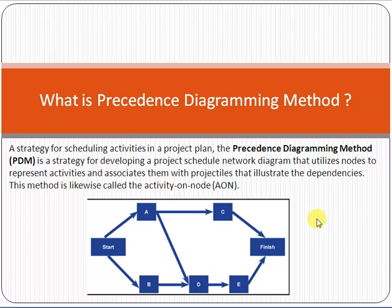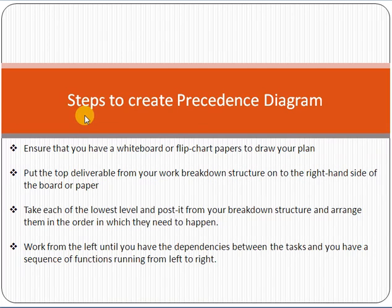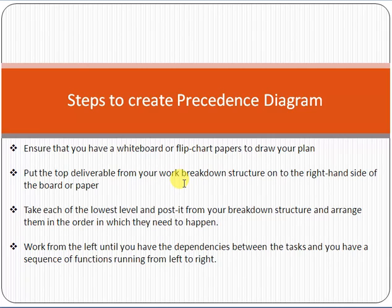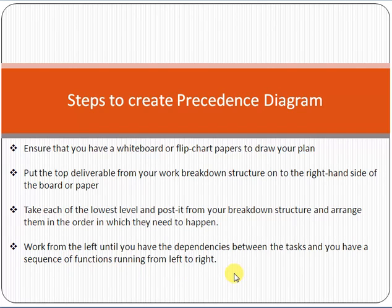This is the concept of the Precedence Diagramming Method: first identify the activities, then identify the dependencies among the activities, and then sequence the activities to make the schedule. The steps to create a precedence diagram include: ensure you have a whiteboard or flip-chart paper to draw your plan; put the top deliverable from your Work Breakdown Structure (WBS) — which means you divide the work and identify the activities until you can quantify them in terms of cost and time — on the right-hand side of the board. Arrange the lowest-level WBS tasks in the order they need to happen, working from left to right.